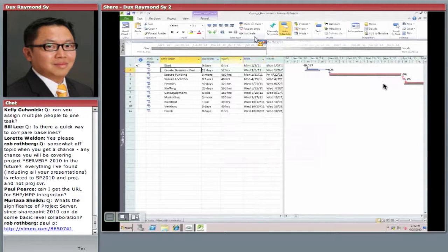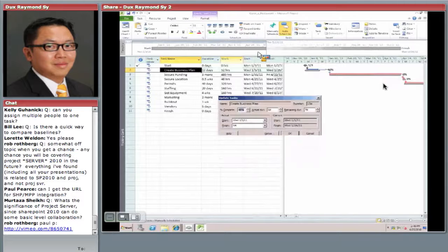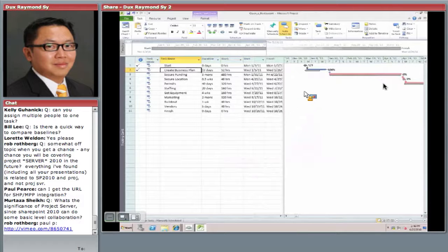Now, after that, I go back to Elaine again and ask her, hey Elaine, are you done with your task? Let's say it's a couple of days later. So when did you get it done? Oh, I got it done on the 26th on the new schedule because I was late. Okay, so I talk to Elaine and I update my task. I go to January 26th, and when I hit OK, boom, notice that it says 100% done. This is checked. I'm moving on to the next task.